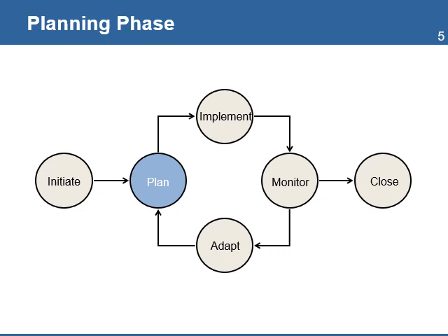Once most of the activities in the initiation phase have been completed, you can move to the planning phase. This is where you will develop the plans to manage the implementation of the project, called implementation plans. These plans have more detail than the plans that were developed for the project proposal. The plans also include plans that are not included in the proposal, such as plans to manage the team, stakeholders, information, and the contract.